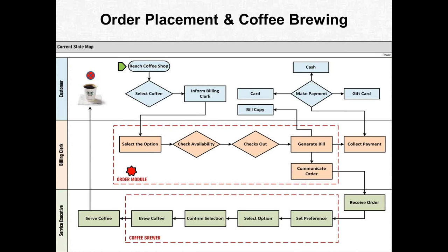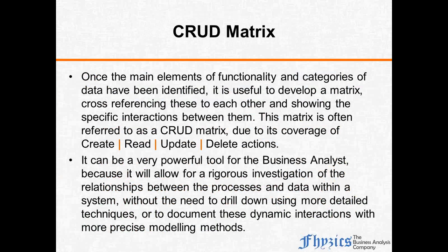And it is a very process-centric approach where we can easily identify the extent of this impact. In a way, it is the impact analysis in your current state, because the current state is the one which doesn't have this facility, right? And when we want to introduce this loyalty system, some changes get into this order module to accommodate the loyalty card acceptance, okay, so I have to change this module. So the PSP approach helps us identify the stakeholders relevant to my process and the systems, and also helps me estimate the impact.